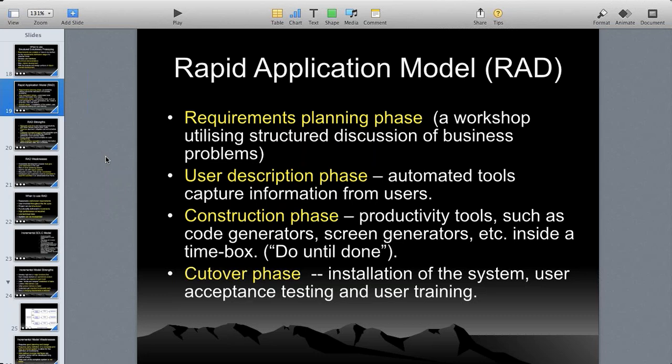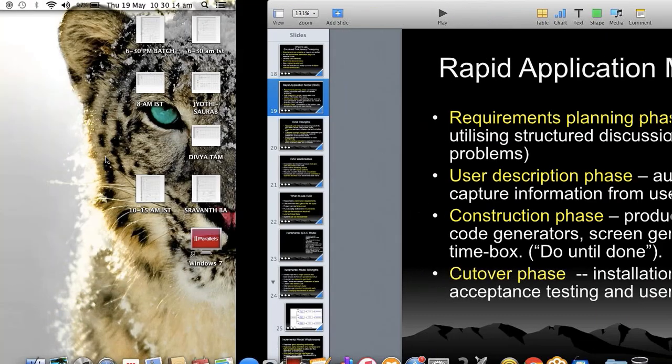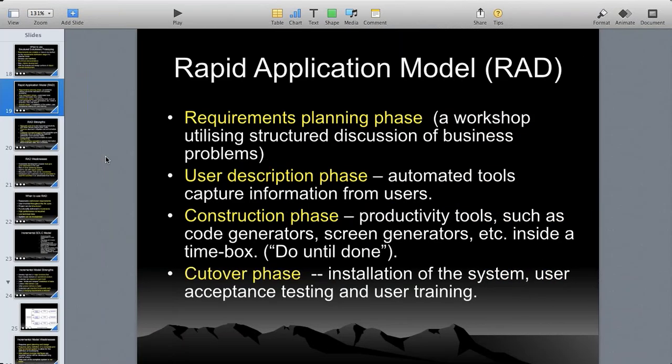So once the requirements are done here, again we should not waste time. What I'm trying to say is, once the development starts, once the testing starts, once the designing starts, if the client wants to change requirements, of course we can change. But what happens if you change? It affects the time again. If it affects the time, it affects the cost again. So that is the reason: finalize all the requirements in the workshop itself in the beginning. That's it. After that, no turning back.